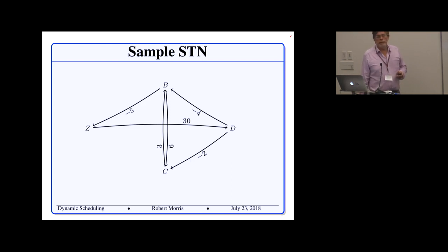It basically means B has a lower bound of 5. B must occur at least 5 times after Z, right? Remember, the negative is always the lower bound. The direction indicates the order of the difference. So the negative 5 means that B has to start at least 5 units after Z. Okay, so